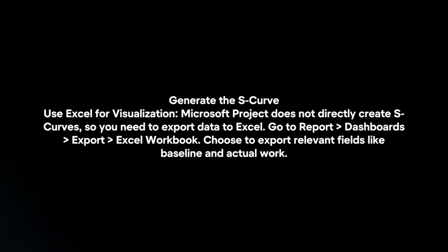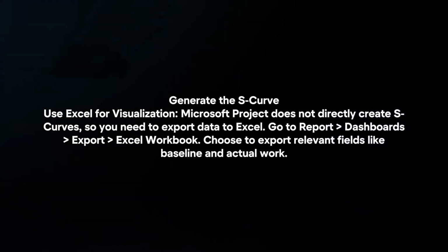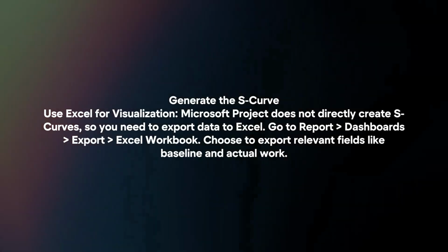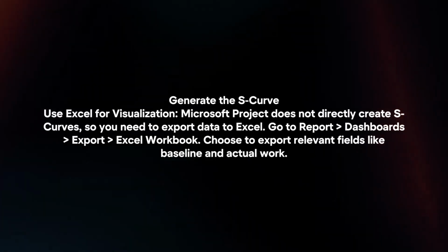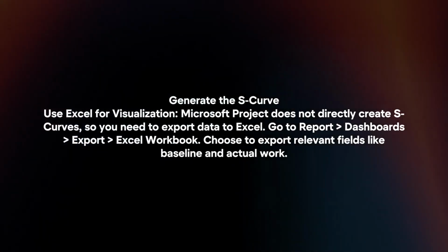Generate the S-curve. Use Excel for visualization. Microsoft Project does not directly create S-curves, so you need to export data to Excel. Go to Report, Dashboards, Export, Excel Workbook. Choose to export relevant fields like baseline and actual work.